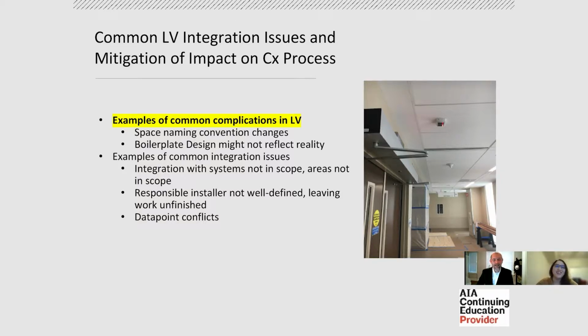Yeah. There are so many situations where, I don't know why, but you have one thing on the designs and you have another thing as the wayfinding numbers on the rooms. And that wayfinding number will change 2 or 3 times right there at the end of the project. After all the doors have been labeled, after the access control system's been programmed with addresses, after some poor electrical assistant project manager has arranged for 700 panel schedules to be printed in hard copy and installed in the panels. I don't know why they always change the room names, but they sure do. Look for that one. It's funny till it's not. Yeah.